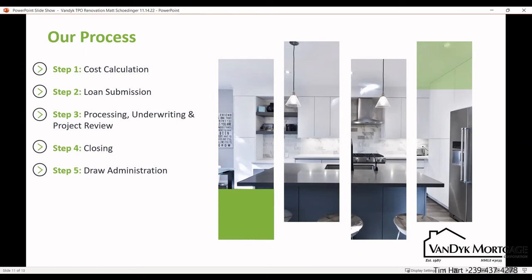Matt, following up Hurricane Ian, the FEMA 50% rule has really started to come to light for us. FEMA is saying that if you have more than 50% of the value of the building itself, not the lot, not external improvements, pools, cages, that type of thing, but 50% of that value, if you exceed 50%, then you're going to have to go in and come up to the elevation now required by FEMA, which is the base flood elevation plus a foot. Okay. So you can go 75% LTV on your product, but administering this, I know the Lee County Commission just voted to change the way the 50% rule is implemented. It used to be all inclusive. The whole package had to come in under 50%. Now they've changed it so that as long as each individual permit is under 50%, it'll be okay.